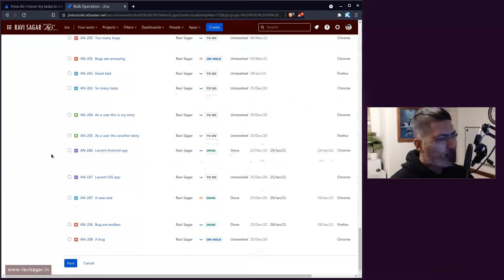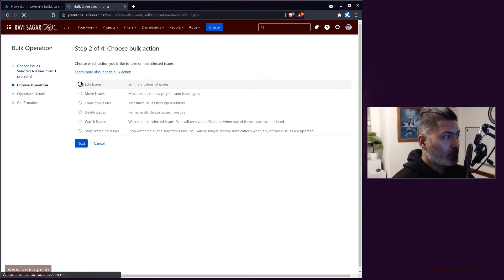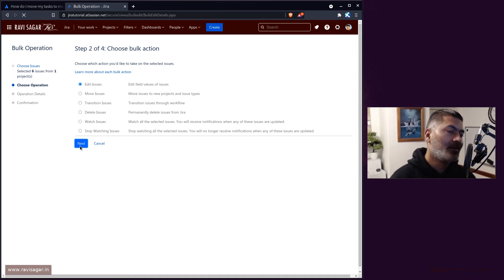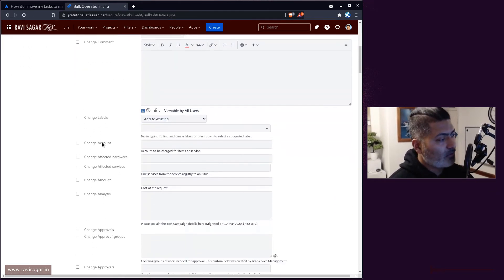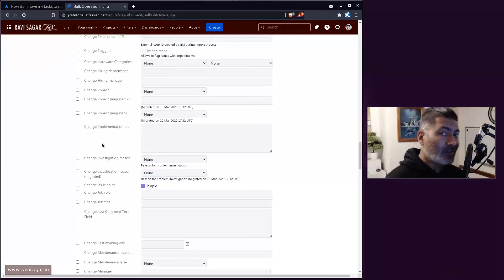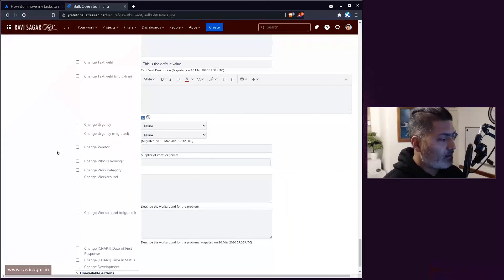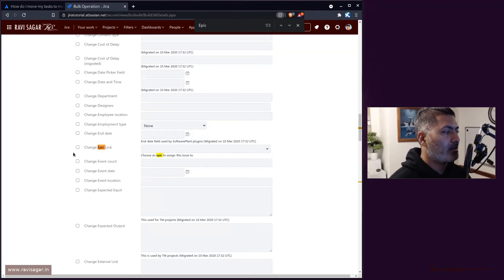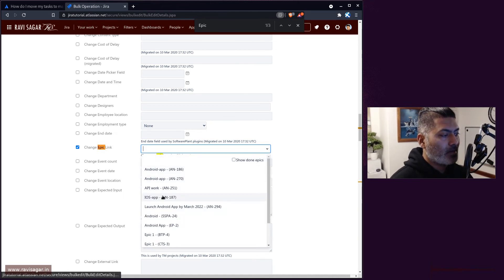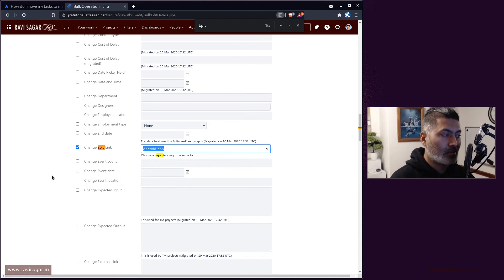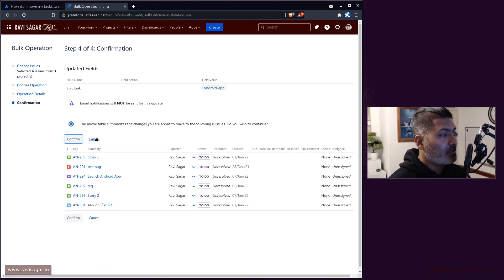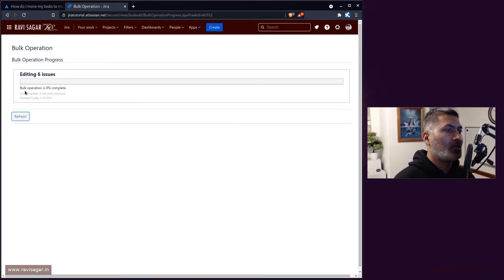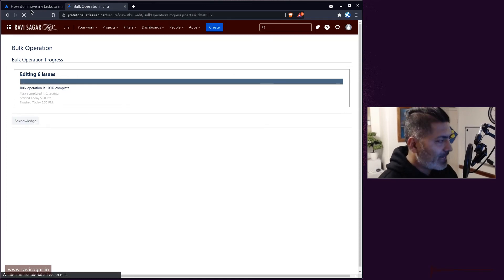Once you have your issues selected, click Next, then select the operation 'Edit Issues'. The field you need to modify is the Epic Link field. Scroll down to find 'Change Epic Link' and select your target epic — for example, AN-270, which is in the same project. Epics can be in any project, by the way. Click Next, confirm that the Epic Link will be updated, then click Confirm and wait for those issues to be updated.